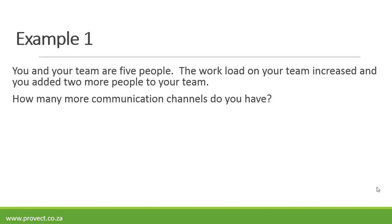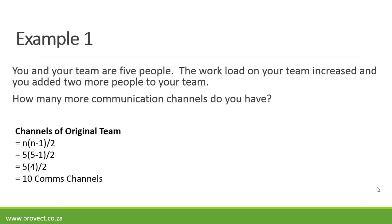Now let's look at a fuller example. You and your team are five people. The workload on the team increases and you add two more people to your team. How many more communication channels do you have? First, let's calculate the communication channels of the original team: five times five minus one, which is four, divided by two — that is ten communication channels in your original team.